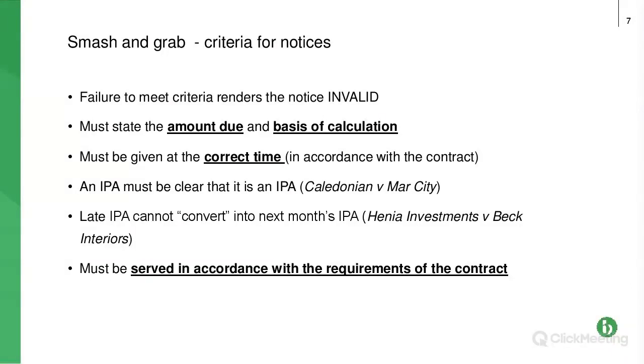Beware though of a situation where, second or first payment notice in, you've not served correctly under the contract, you're unlikely to benefit from a course of dealing. Also, just be careful of a situation where, for example, you're emailing thinking, well, that's all fine because the other side haven't complained, but they're serving properly in accordance with the contract. So probably email and post to you, because then, if you get to a smash and grab scenario, they will argue you've not served properly, they have throughout the contract. And again, this criteria, it all has to be complied with.